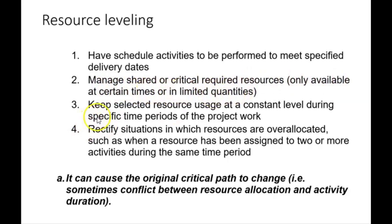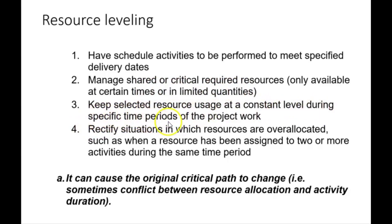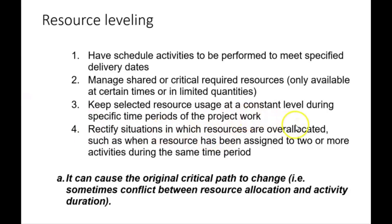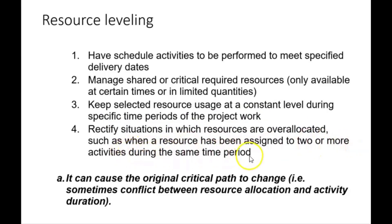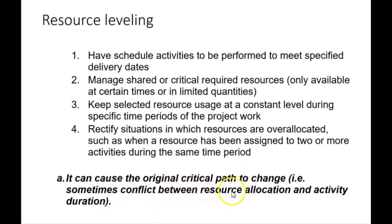It can be used to keep selected resource usage at a constant level during specific time periods of the project week, and also to rectify situations in which resources are over-allocated, such as when a resource has been assigned to two or more activities during the same time period. It can cause the original critical path to change; that is, sometimes there's conflict between resource allocation and activity duration.